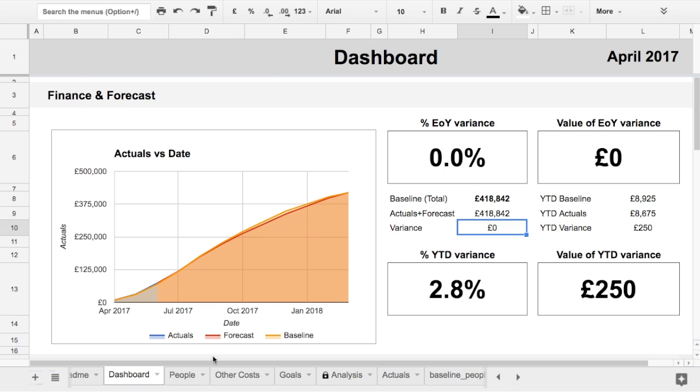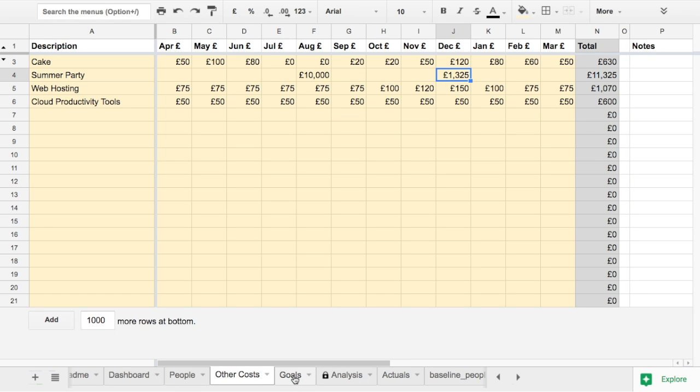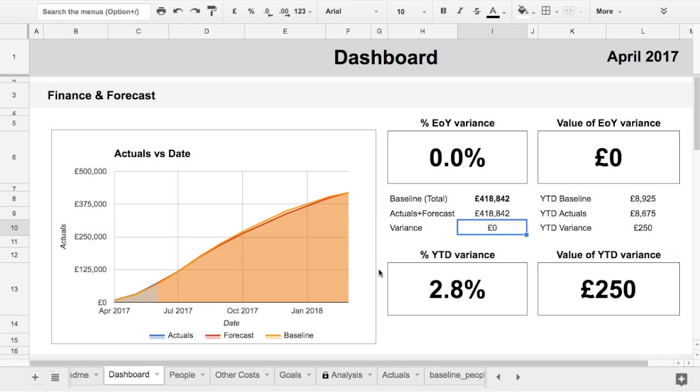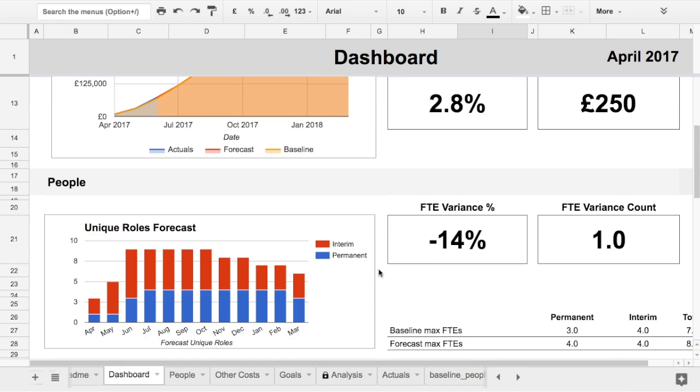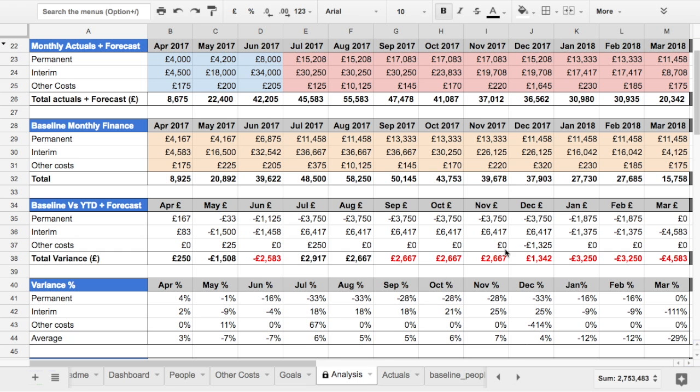In this model, I'm free to adjust how, and even what and when I deliver, as long as I stay within the major commitments I've made with my team and my stakeholders. But what if I wasn't able to deal with this issue without spending above my budget or failing to deliver against some agreed goal? In this scenario, I'd need to ask for help outside my team. In other words, I'd need to escalate this issue to whomever controls my spend and will be impacted by my delivery or lack thereof. Similarly, the business could come back to me and request that I modify my spend, headcount, or scope to fit with some new decision or requirement from outside my team.